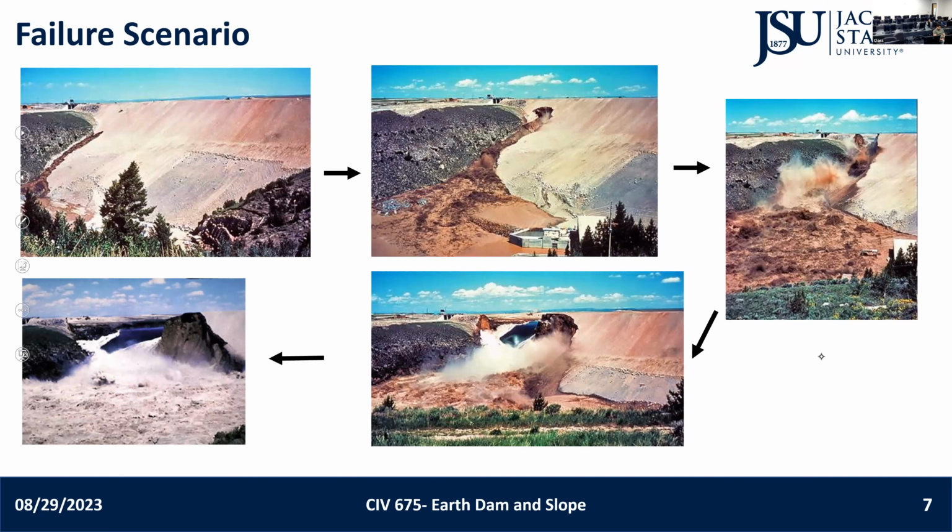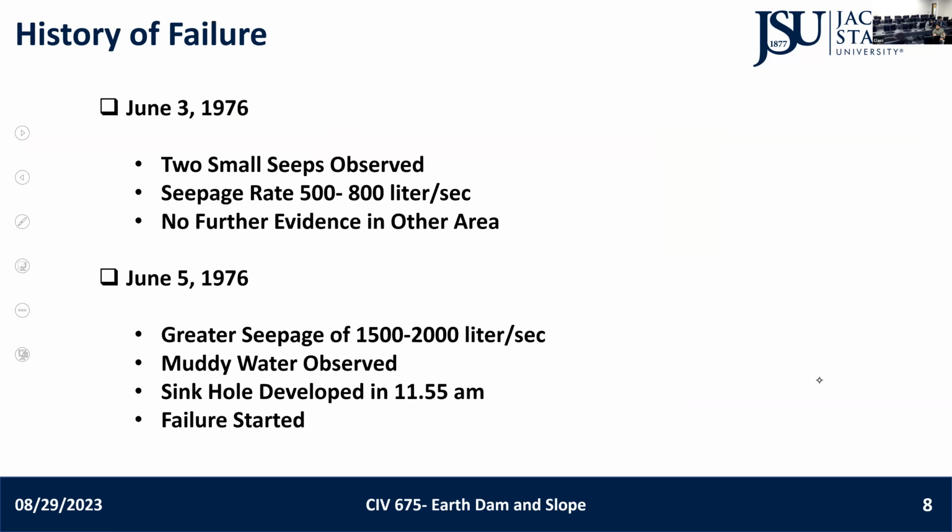when the dam was constructed in 1975, from October to April 1976, they started filling the water very slowly. The initial elevation was 5060 feet, and in April 1976 the elevation was 5160 feet. But suddenly, from April to June, the filling of water increased a lot, and from April 10th to June 1st, they filled up around 160 feet, and the final elevation was 5320 feet.